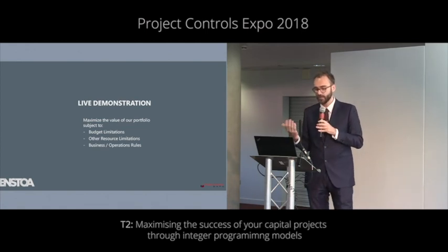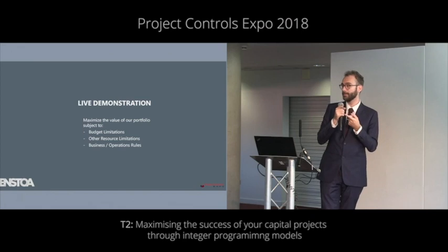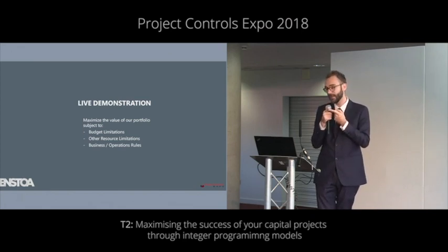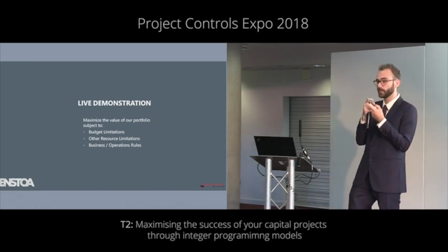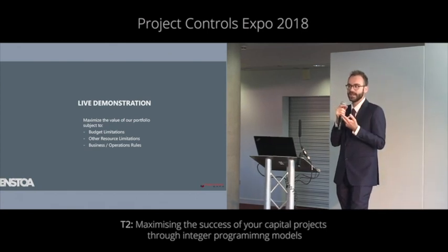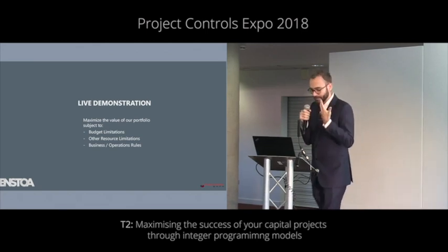Thirdly, and through the rest of them, you need to have some data on each project. So at a minimum, each project must have a duration, ideally estimates for phase duration, that would be best. And each phase, if specified, must have a cost. So you must have project duration and project cost data, which is reasonably high level data. You don't need a data scientist full-time to get that kind of information. Most people have at least a rough estimate of that reasonably handy.